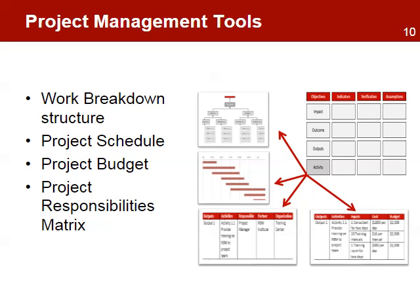The use of project management tools helps manage implementation of the project intervention. These management tools are: the work breakdown structure or WBS, that describes all the project activities; the project schedule with the estimates for the completion of each activity; the budget with the cost estimates for each activity; and the responsibilities chart with identification of the people responsible for doing the project work. These tools use information from the log frame activity level.